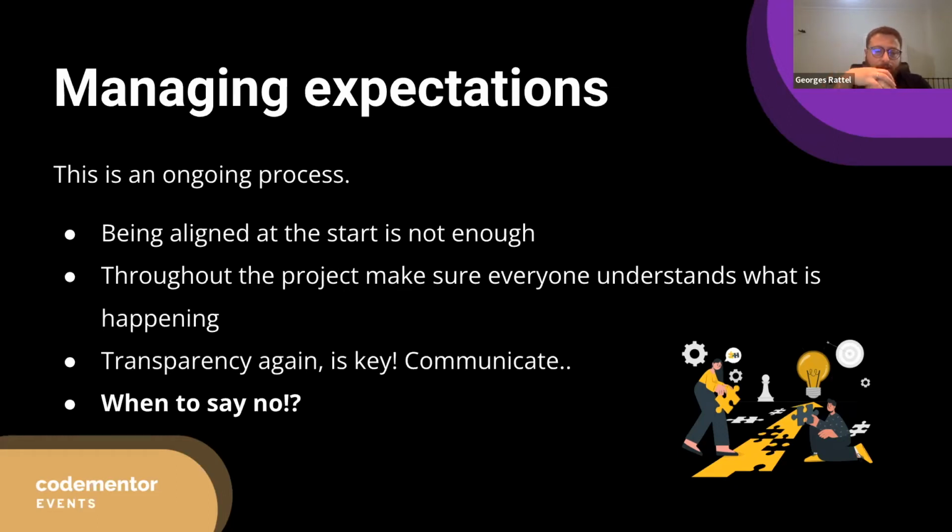So it's important to know when to say no, when not to say no, when to accept a change, when not, and how to actually go around this from the beginning. And again, it's all about managing expectations. You can agree with the client from the beginning that no changes will be accepted, or you can agree that changes will be accepted, but every time there's a change, the budget will change and the timing will change, or other terms. It doesn't really matter what the terms are.